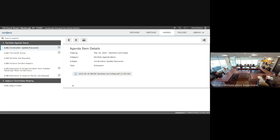Do you have an anticipated bid schedule? An award timeline? We do, and I sent that out to the district for your review. If you need the dates, we have them in here too. So release for bid on May 22nd. The bid opening, we're anticipating June 12th.